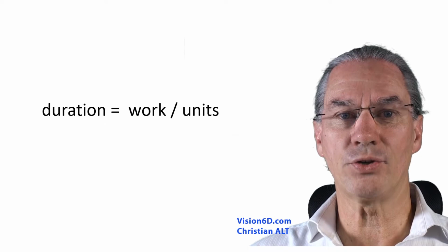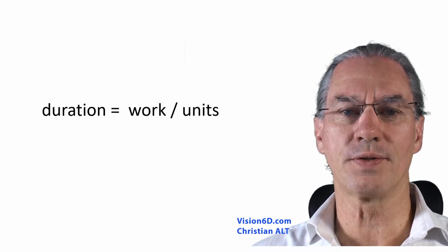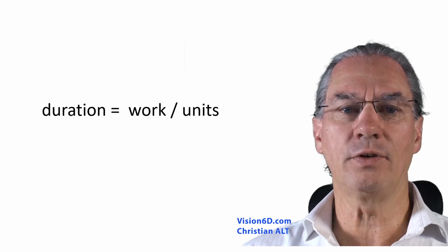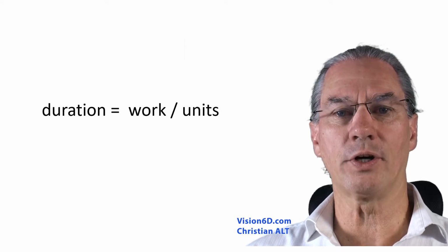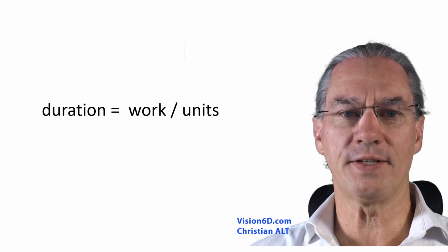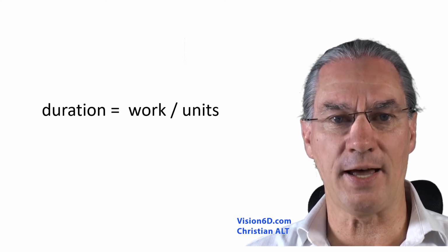There is a relation that exists between duration, work, and units. Duration is the interval of time between the start and the end of a task. The work is the number of hours that were really spent on this task.